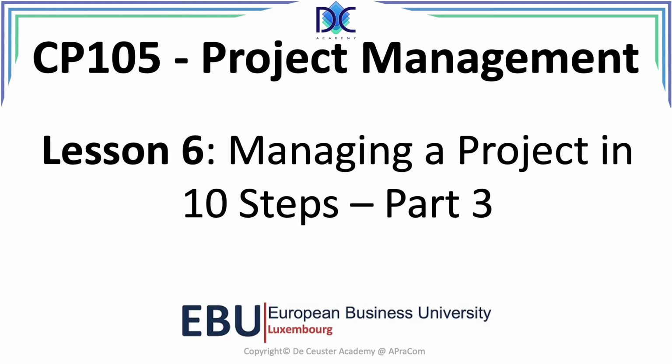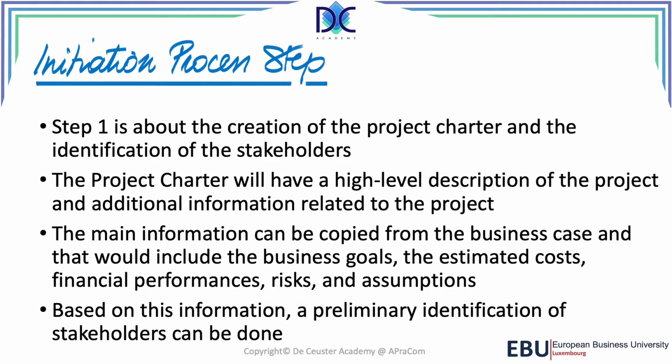Here we're going to look in detail into the different steps, and we also link some specific information to these steps. First of all, we have the initiation step, and here we are creating the charter and identifying the key stakeholders. It's not possible to identify all of them. The charter is a high-level description of the project. No technical information there.